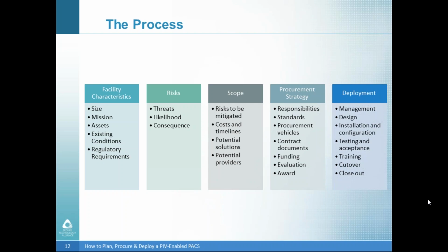It's important to look at this from both an operational and a technical perspective, so we'll also evaluate the existing systems. We want to know what equipment is installed, how old it is, how well it's operating, whether it's supportable or not, and what, if any, pieces may be able to remain. It's not uncommon for PACS systems today to interface with other systems like CCTV or intrusion detection, so you want to identify those systems during this process as well.